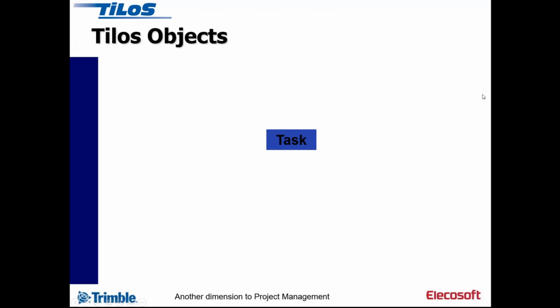So the other important thing is about activities, tasks in Tilos. They are exactly the same as you would find in P6, Microsoft Project, Power Project, any of these things. They've got a start and end date, logic, links, resources, cost, WBS structures, activity codes, calendars, but they must have a start and end distance. You have got to give them a start and end distance. When you use Tilos, you're naturally giving it to them because it's the way you use it. But if you're using an external system, you need to type it into 2 columns, and we will cover the subject of import, export, and talk about your primary system P6.